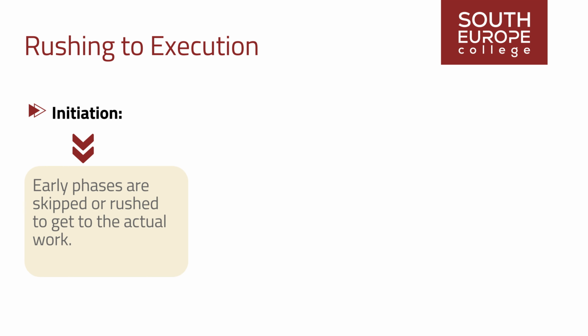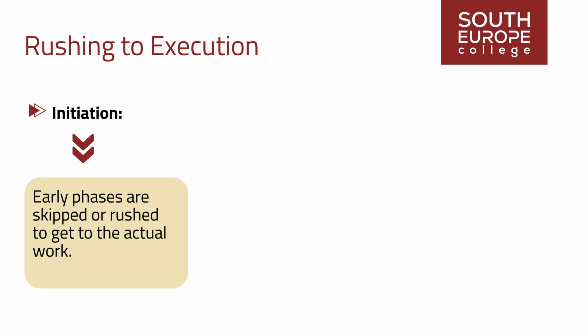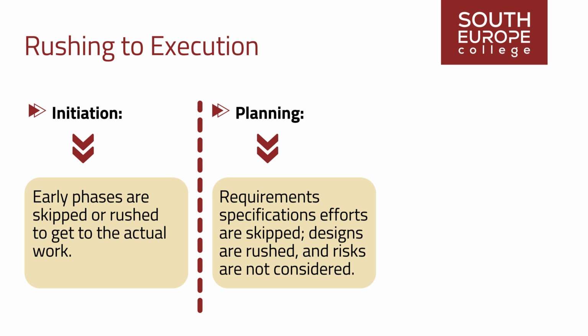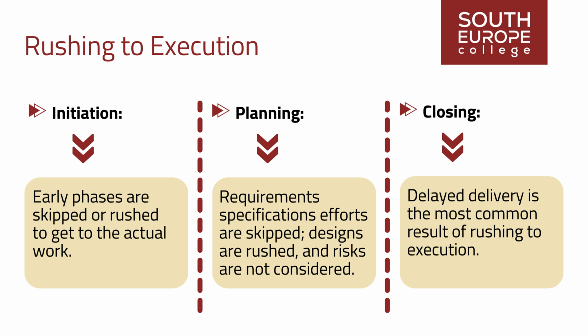Initiation. Early phases are skipped or rushed to get to the actual work. Planning, requirements, and specifications efforts are skipped, designs are rushed, and risks are not considered. Closing. Delayed delivery is the most common result of rushing to execution.